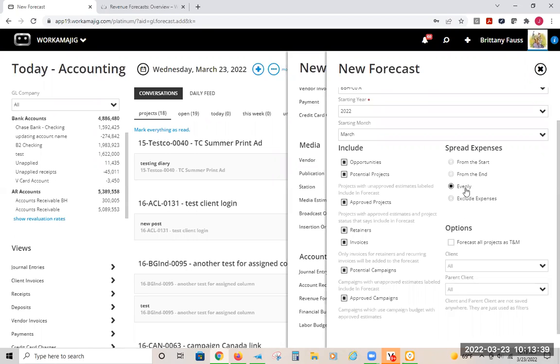One caveat towards evenly is when you create an estimate, you go in and estimate for an expense. If you track an expense all the way down to the task level, so when you add an expense, there's the task field. If I do that, even if I put evenly, it's actually going to look to the task date to then indicate when that expense would fall and what month that would fall in. Okay, so we'll take a look at what that really means when we get there.